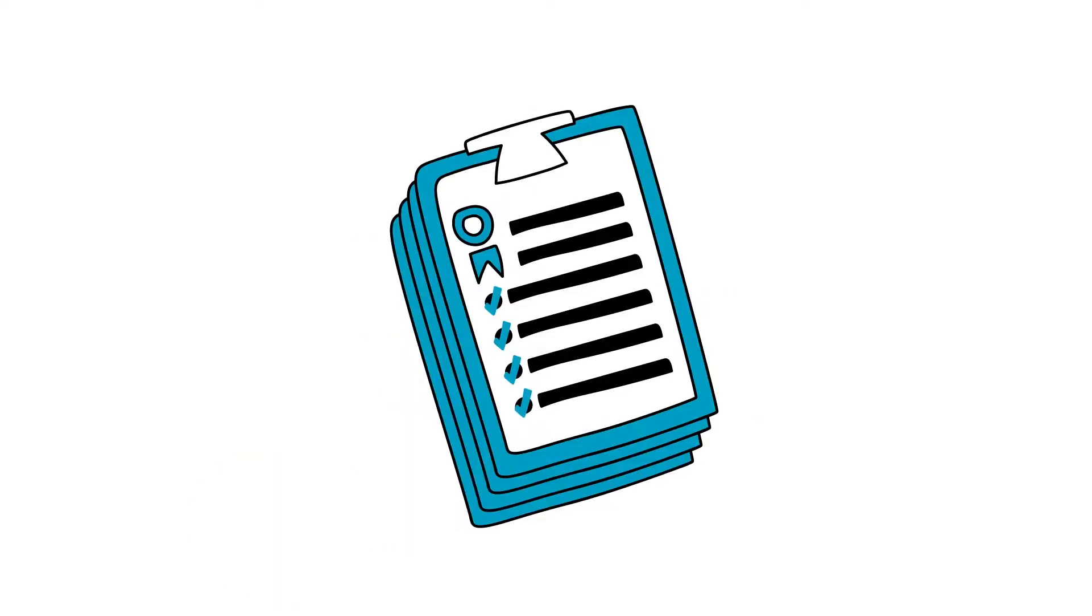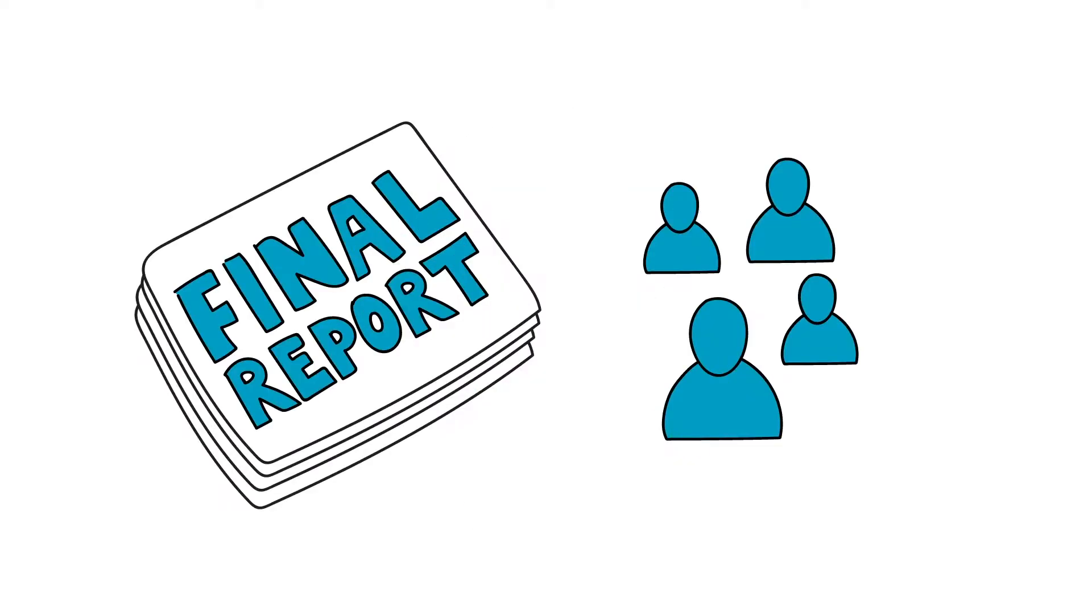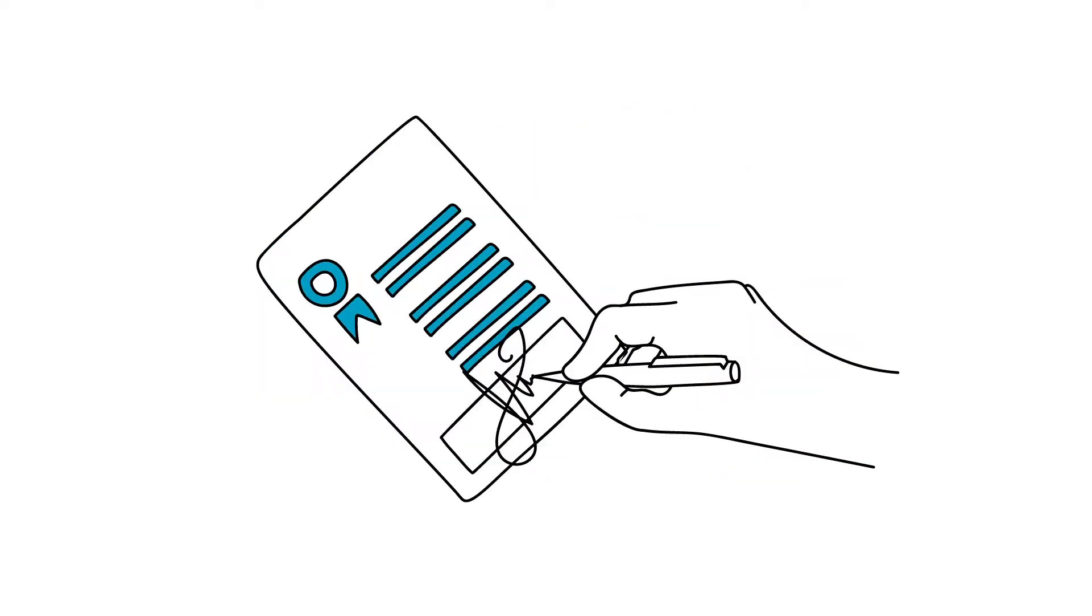To begin, she confirms that all of the project's contractual obligations are met. Have donors accepted the deliverables and received the final report? Are contracts closed out for all the vendors and sub-grant recipients?